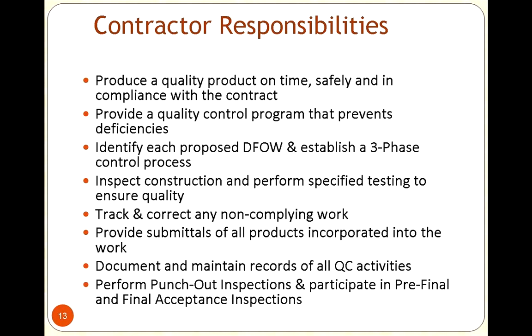I remember one of the parts of this project was that we had to install some communication routers and some other technical doodads up on the wall. Well, essentially the way that they had to rig them was they would take a piece of plywood and they would attach the wiring and the cables and all the boxes to it to plug into the network. Well, one of the things that they were supposed to do in that process was they were supposed to paint that piece of plywood with a fire-resistant paint. Well, because things weren't translated to the subcontractor, next thing you know, you've got this box up on the wall and it's non-compliant according to the specifications that were in the contract.